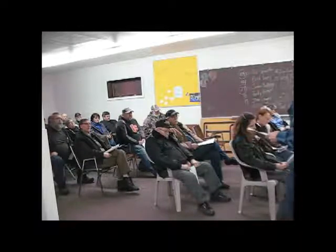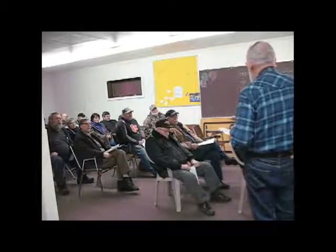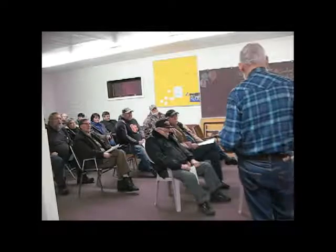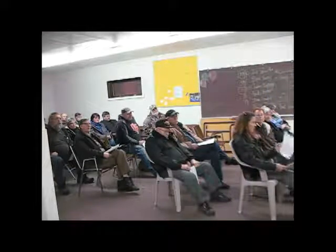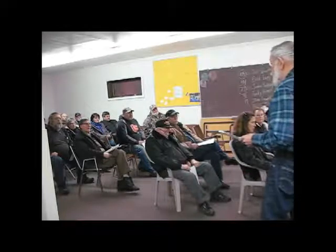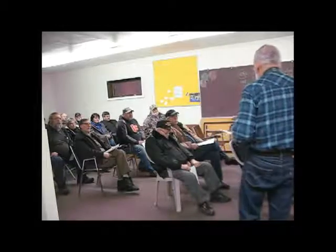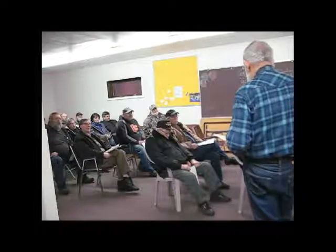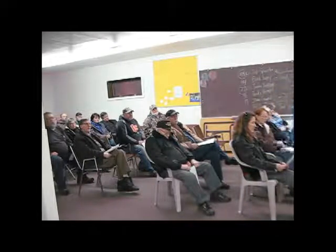How do I fund that amount? Basically, we set aside a certain amount of money out of the RSA budget every year for capital projects. Some are really small, $20,000. Some are pretty good size, $300,000, $400,000, $500,000, if it was a big enough project. So part of it's funded right up front out of our base annual budget. Part of it comes out of that fund balance. If there's a fair chunk of money left in there, that's another pot I can reach for.